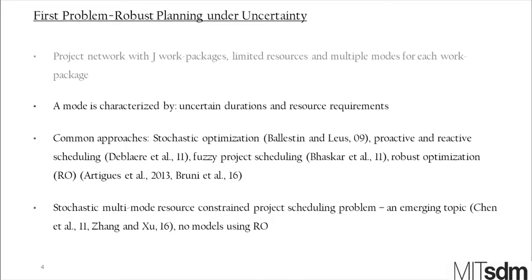if the target of the work package is to design a component, then two alternatives may be, one, to reuse the component from a previous or similar project, and the second alternative, or the second mode, would be to design the component from scratch. Choosing each of these modes has implications on durations, resource requirements, and performance. And we consider the durations and the resource requirements as uncertain.